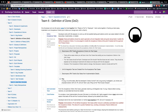Decompose your ticket acceptance criteria into test cases. There will be cases where you will have more test cases that satisfy just one acceptance criteria, so don't be alarmed — it's not a one-to-one thing. The test cases should be fluent; developer and QA shouldn't feel like those are written in stone. They should be adjusted as a developer implements the feature and discusses that with the QA assigned. However, if the acceptance criteria needs to change, that discussion needs to include the PO.